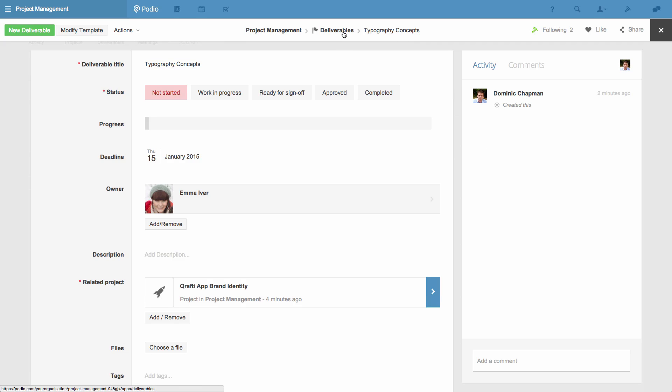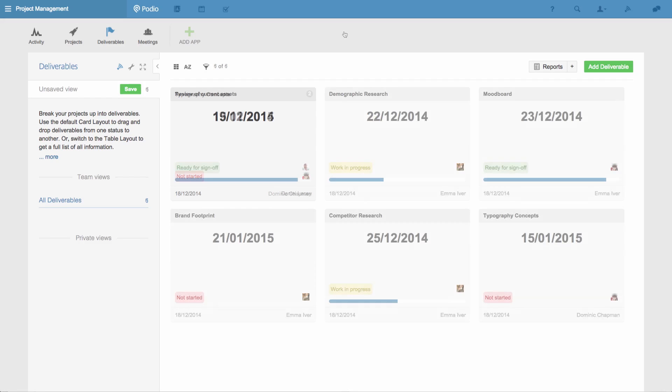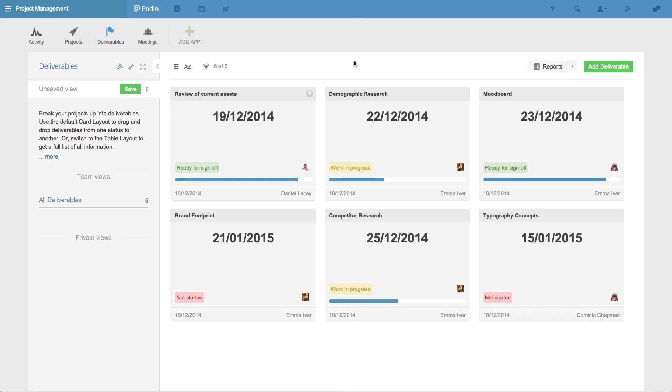Now I can go ahead and create the rest of the deliverables for my team. I'll fast-forward this too, so you can see how it looks once I'm done. We've got deliverables to look into competitor research, create a brand footprint, style guide and more, with different deadlines that fit the order of the work that we're going to do.